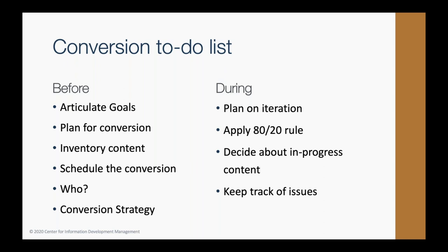Some things during the conversion. Even if you have a detailed conversion specification, there will be data patterns that are not accounted for that you'll find. So plan for the time to investigate and decide how best to proceed. Have a plan for what to do about the things which are true anomalies. Is it more cost effective to have a person fix those one or two instances, or to ask the vendor or whomever to update the conversion software to accommodate those edge cases?